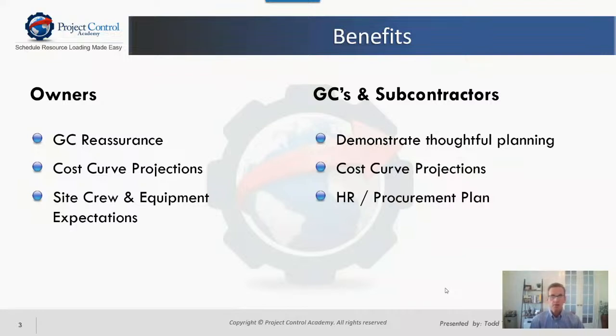And so really there are two major areas. First, the high cost items, you don't want them sitting around too long from a cash flow standpoint. And then especially today, long lead items on many things. The more information you can give the procurement folks as to when that's going to be needed, they can work backwards and figure out when to order that. Reducing round trips to estimating.